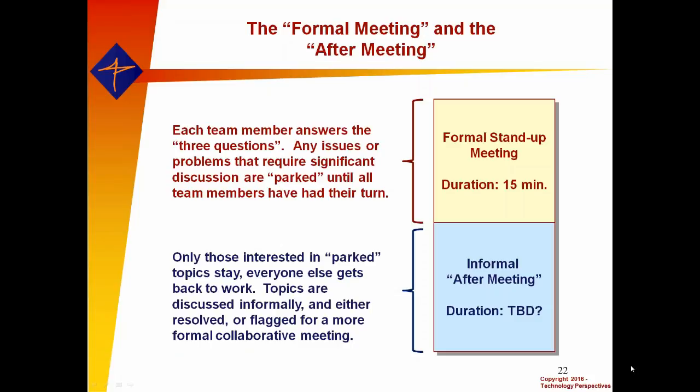We hold that topic until everyone has had a chance to speak, the formal part's done, and then we have an informal after meeting. Anyone who wishes to stay and discuss those parked issues is welcome to stay, have an ad hoc meeting. Anyone who is not involved in those issues can go back to work. And so we can use this as a clearinghouse for issues without having everyone have to sit around listening to things that they're really not involved in or can't contribute to.